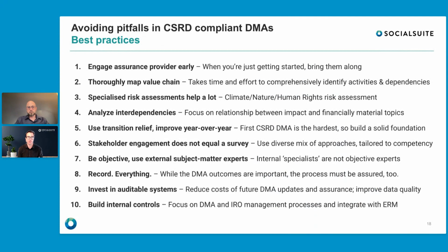Why is that so important in this case? Well, with the DMA, you're going to need to have both the process and the outcomes of the DMA assured, and that can take time and it can be costly. We have a very short amount of time until many companies need to report. So you'll want to build in time for assurance, both of your DMA as well as your disclosures. And some of the leading firms that do assurance might not have that availability.